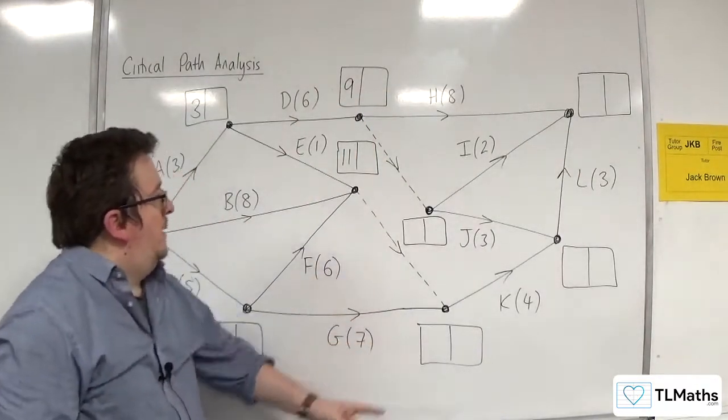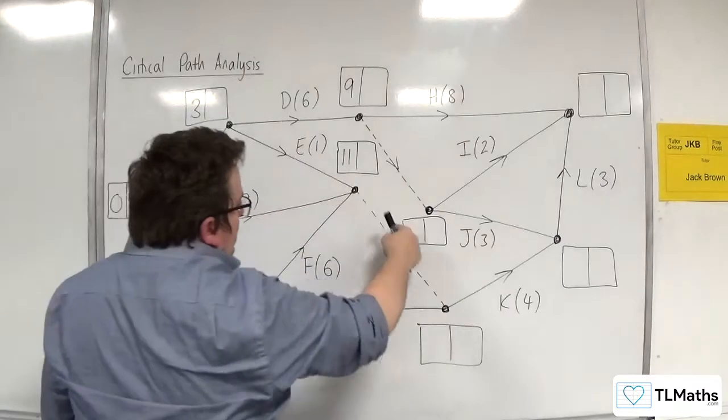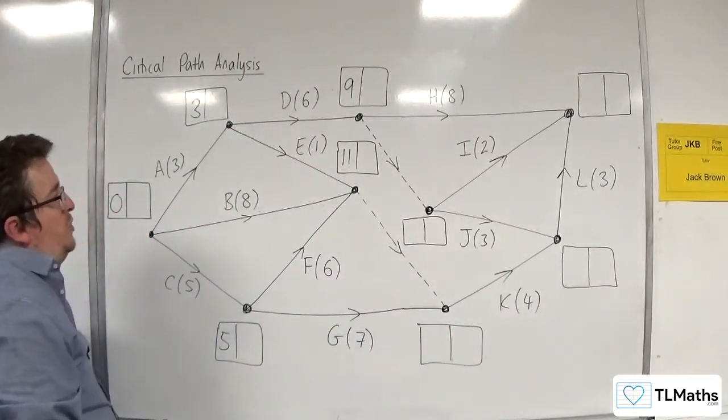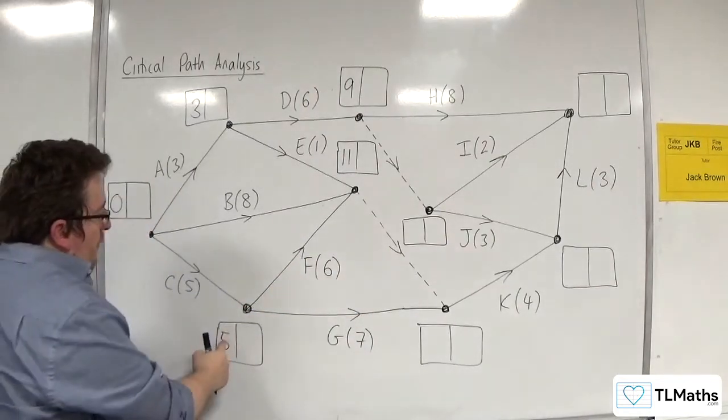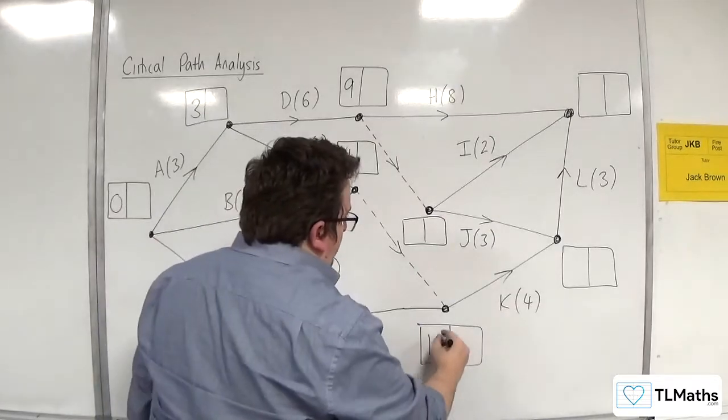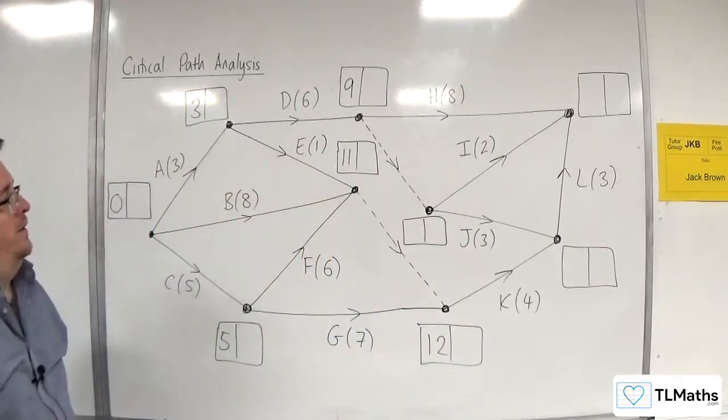Now, how about this one? We've got 11 plus 0, because that's a dummy activity there, so that's 0 duration. So we've got 11. Or we've got 5 plus 7 is 12. So it's got to be 12. We take the larger of the options.